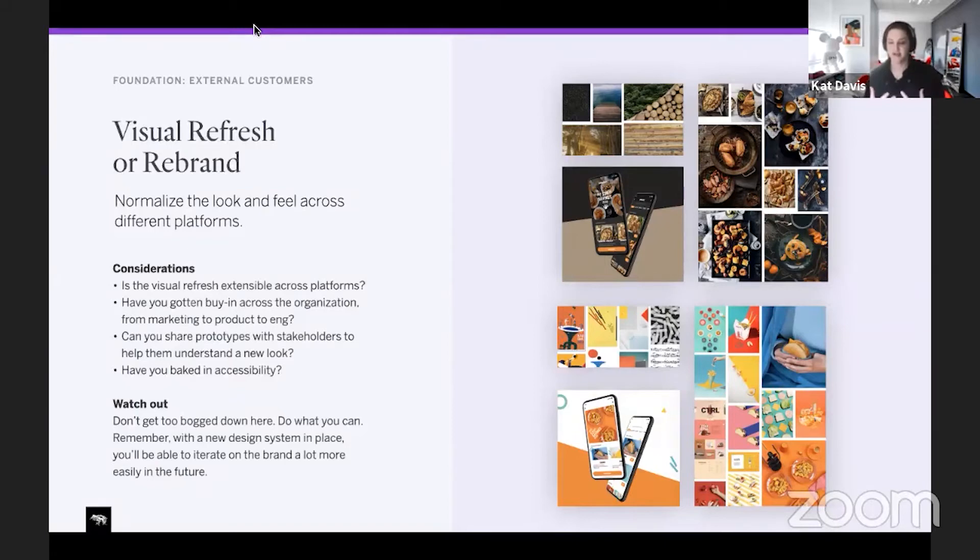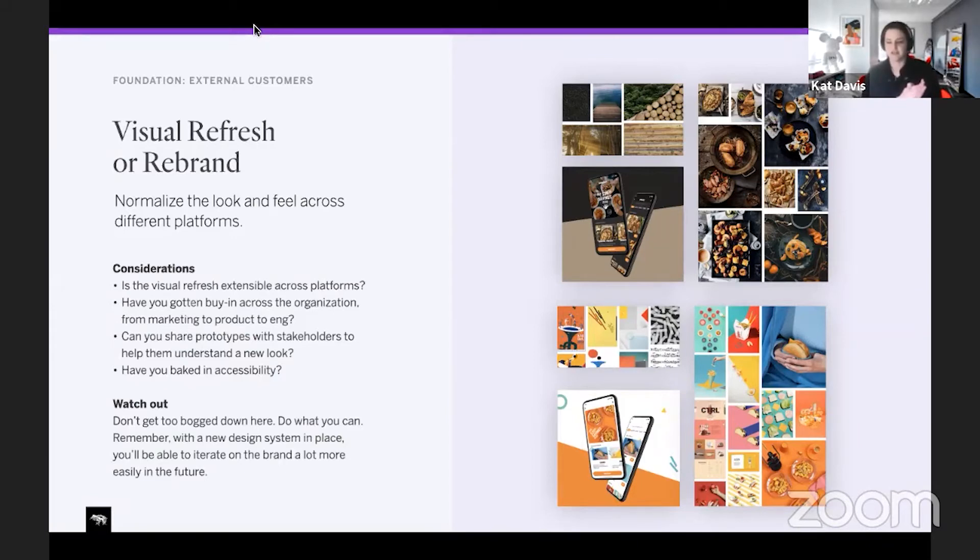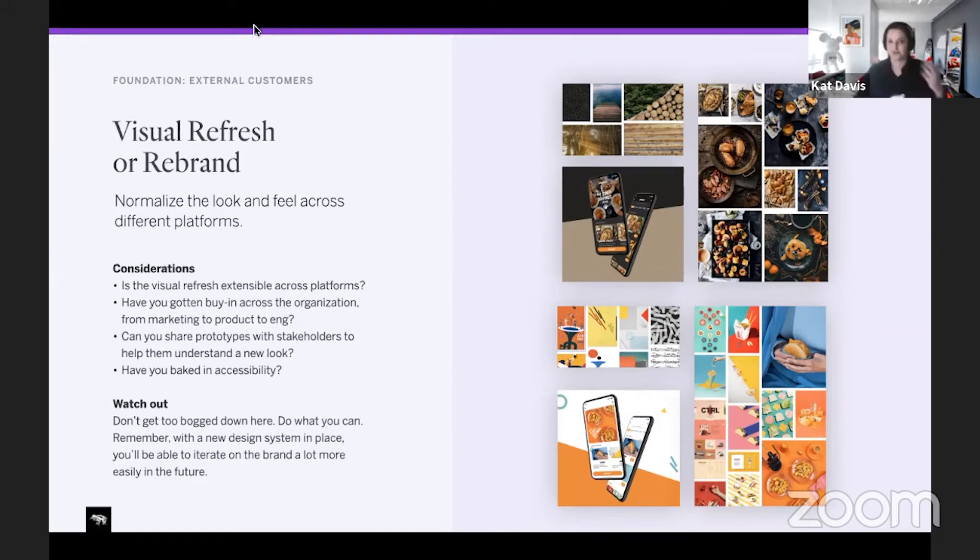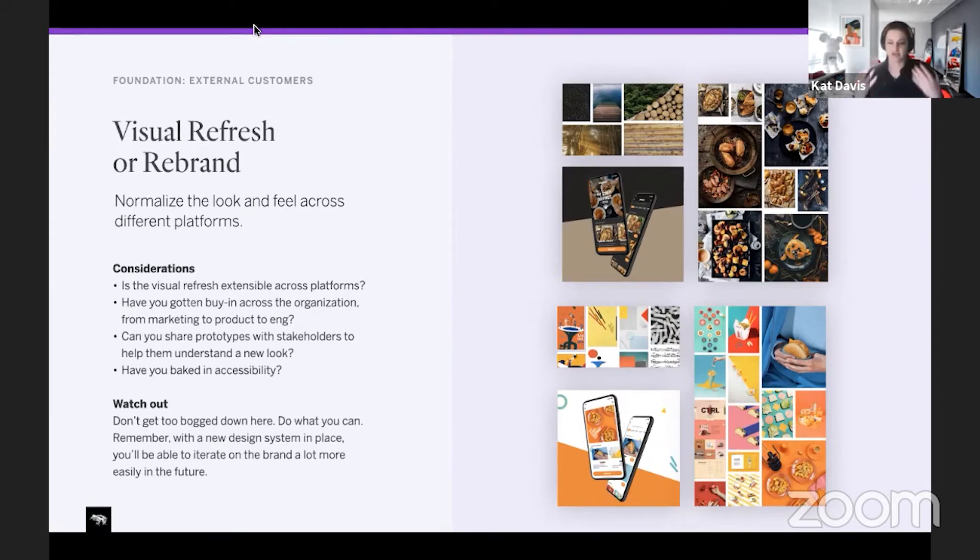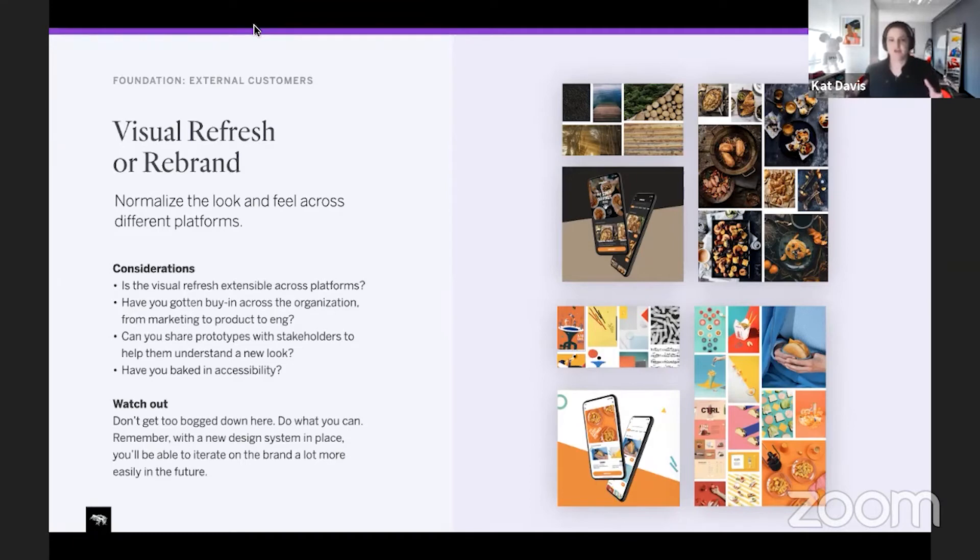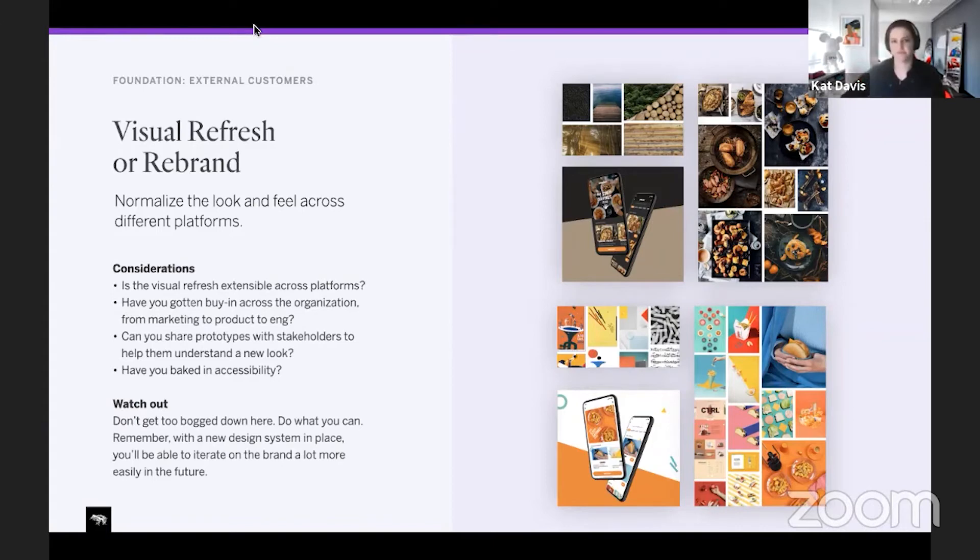Definitely trade-offs there. If your goal is to launch a design system and get speed to market faster, it's important that this doesn't go off the rails in a full redesign of what is all our photography, illustrations, full new icons - that can spin out of control and you're not going to get your design system launched. So realize and help communicate to stakeholders that this is something we're trying to get that MVP out there, and try not to be too far from our current experience so that we can roll this out more iteratively. We can always update the brand, do this whole rebrand effort after we get the design system in place.